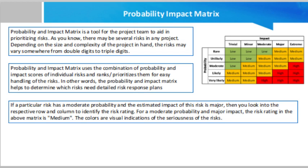The matrix generally used is a three-by-three matrix with low, medium, and high ratings for probability and impact, or a five-by-five with very low, low, medium, high, and very high ratings. A sample probability and impact matrix is shown in this video. If a particular risk has a moderate probability and a major estimated impact, you look into the respective row and column to identify the risk rating — in this case it is medium. Colors are visual indicators of the seriousness of the risk: green means low, red means very high, yellow means medium.